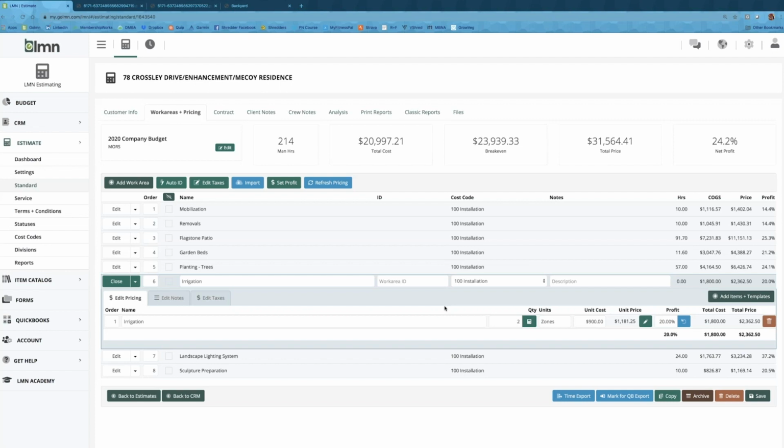Now, I've always kind of said if you're dealing with legitimate subcontractors, like actual companies, they've already put overhead recovery in and a healthy profit. So you may not have a lot of room to add more. But if you're dealing with a smaller operator, maybe a stonemason with his own truck, charging you an hourly rate or a day rate, they might not be charging a lot for overhead recovery. So you may be able to get a bit more.